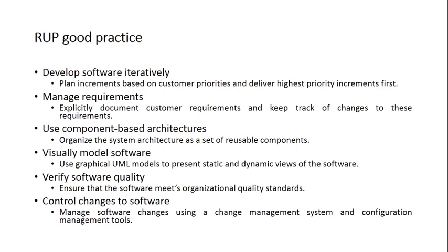As of now, just understand we have a process to make the changes, where the changes are made by some authentic users, once the changes are approved by the change control board, and others have to wait until the change is implemented and updated, and everyone then uses the new changed document, not the previous one, right? So that is control changes to the software that is applicable in this model.